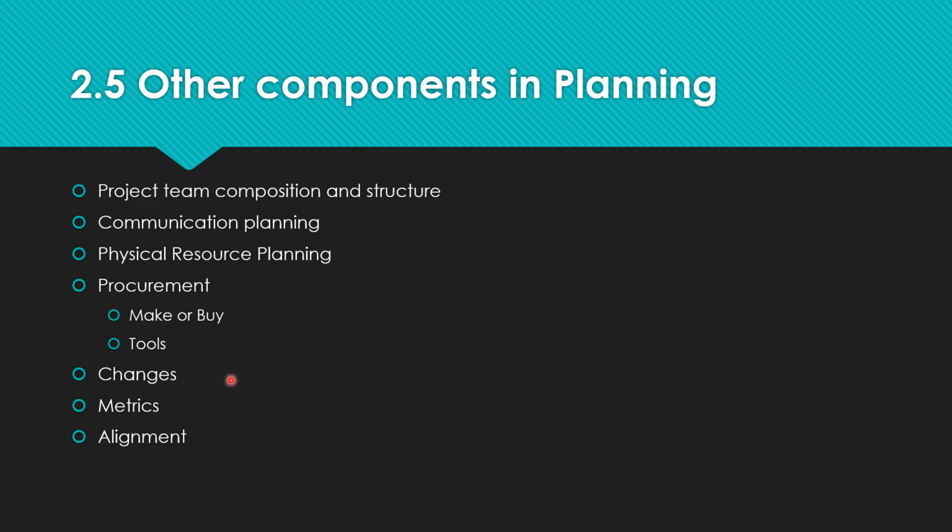Right? Even within sprint execution, you can accept changes from the customers. But in a predictive approach, the change management approach should be available. You should have a change log, a change approving mechanism, and impact analysis, and you should have a meeting and come to a consensus that these are the changes accepted and this is how we're going to do that.